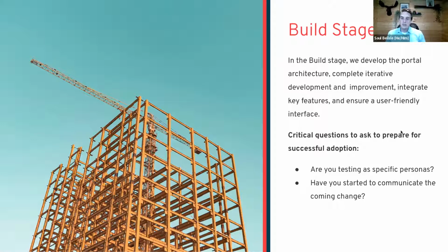The other thing that's often missed at this time, because it's so busy, is that the go live date starts to sneak up on us. And we often get to the end of the build stage and realize, oh shoot, we need to go live in a couple of weeks and we haven't told anybody. So now is the time to start communicating that change to your community.